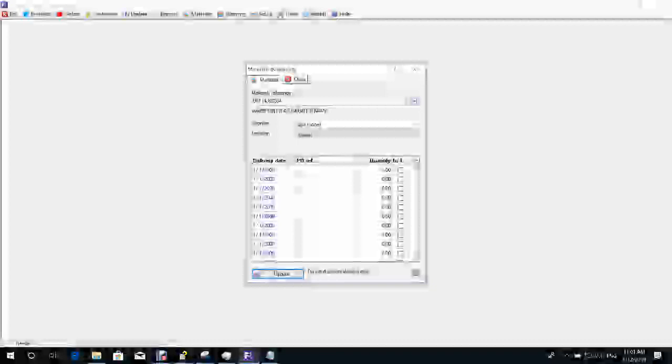Sometimes we don't have materials, so we book it from the beginning. And sometimes we have fabric in store now. So if we have the fabric in store, we will record it as available. The fabric is available in the stores when we receive the official PO. And we will give a date for accessory because the accessory is always not available in the stores. We give him 2 weeks, 3 weeks, 1 month according to the type of the accessory.